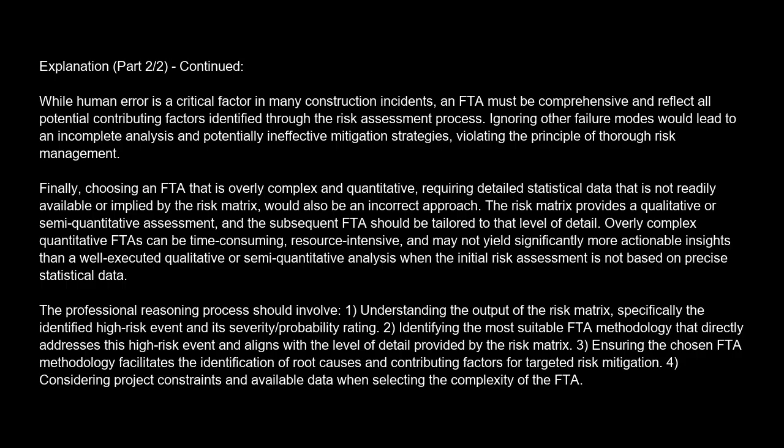The risk matrix provides a qualitative or semi-quantitative assessment, and the subsequent FTA should be tailored to that level of detail. Overly complex quantitative FTAs can be time-consuming, resource-intensive, and may not yield significantly more actionable insights than a well-executed qualitative or semi-quantitative analysis when the initial risk assessment is not based on precise statistical data.